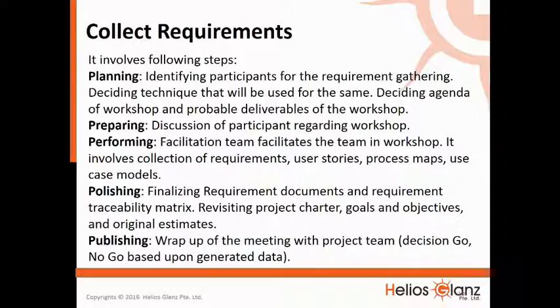It involves following steps: planning, identifying participants for the requirement gathering, deciding technique that will be used for the same, deciding agenda of workshop and probable deliverables of the workshop. Preparing, discussion of participant regarding the workshop.